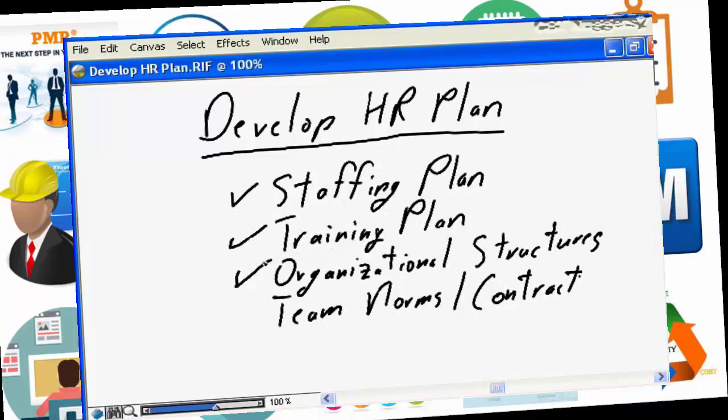You need to develop efficient organization structures. You need to ensure that you have a project organization in place that recognizes span of control to make sure that the teams report to leaders who have the knowledge, the skills, and the authority to manage the team, that the teams have appropriate scope of control, that the teams work on a consolidated focused area, that the team leader has the appropriate number of resources reporting to them. Again, a norm being no more than 7 to 8 resources reporting to a leader, that you have an effective organization structure in place for your project, that the teams can work effectively.